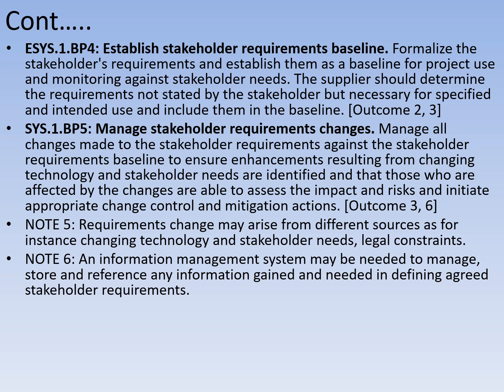Now, everybody who has experience in the industry knows that even though stakeholder requirements are clearly understood, as time progresses, stakeholder requirements change. They are transient. They are not rigid. Now, manage all the changes made to stakeholder requirements against the stakeholder requirement baseline to ensure technology and stakeholder needs are identified, and that those who are affected by changes assess the impact and risk to initiate appropriate change control and mitigation actions.